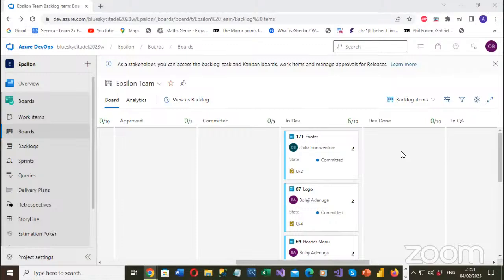So you just wait, hoping that by the time they say dev done, if a developer says dev done, do you know what that means? It means I have finished working on this ticket. I am providing you with a working URL. I have deployed this implementation into the QA environment. It also means I have also done the testing that I, the developer, need to do. And that is dev done.